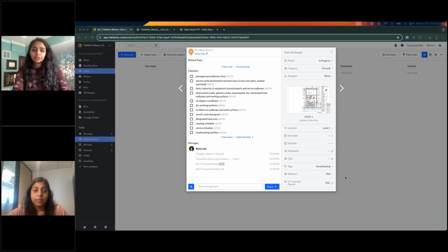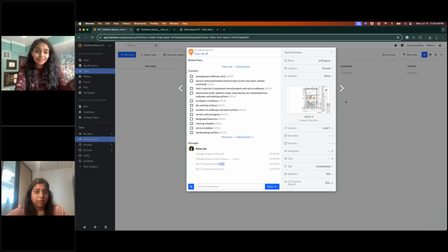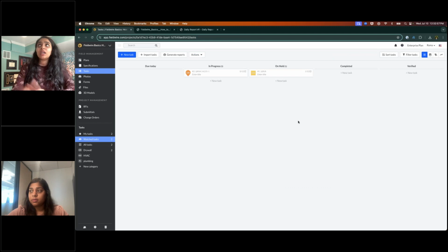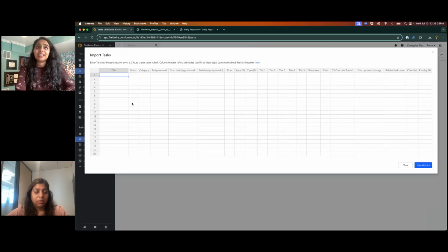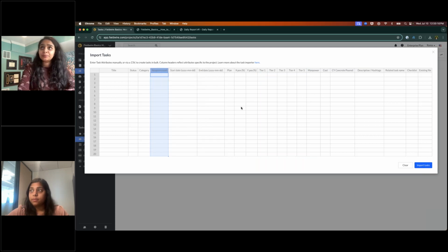So I wanted to jump into creating a task. You saw me create one on the plan. I think that's great for, again, your field team. They're seeing these issues as they're walking around, but let's say we're setting up a project, right? So let's say we got our baseline schedule, our SOV, basically all the data we need about this is the work we need to do, and we can come to this task importer. So this will allow us to put in any of those task attributes. You can see here my different tiers for location, start and end date, even who it's assigned to. And you can see that my CTA of concrete is there.